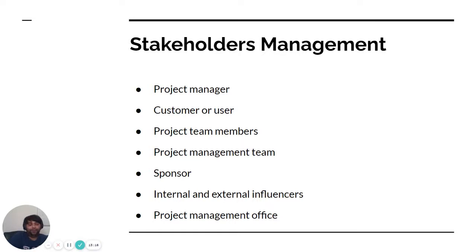So before we move forward, let me give you one typical small or medium size project team. You can note it down if you want to. One project manager, one or two BA people, one architect, two to three developers, two QA testers, one scheduler or coordinator, or we can say scheduler or coordinator as a scrum master.